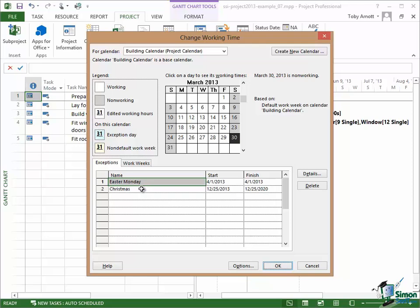Now if you're following this course in a subsequent year beyond 2013 then I hope you're going to adapt this accordingly. But the next thing for you to do is to add the rest of those public holidays. Add them for the year that you're following this course in which might be 2013, might be 2014, 2015. And where you have a holiday that can be repeated on an annual basis, something like Christmas Day or any other day that's a fixed date in the year, then schedule it up to 2020. You could schedule it even farther if you want to, but schedule it to at least 2020.